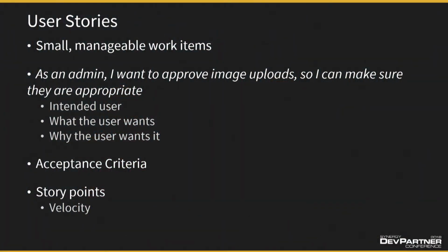User stories can be estimated in hours or story points. Story points help your team relate user stories to one another when the hours could vary. Story points are agreed upon values that are unique to each team. Story points could take a different amount of hours to be done depending on the individual, but the weighting will stay consistent between the actual user stories. And they're also used to help measure velocity, so you can come up with a burn down.